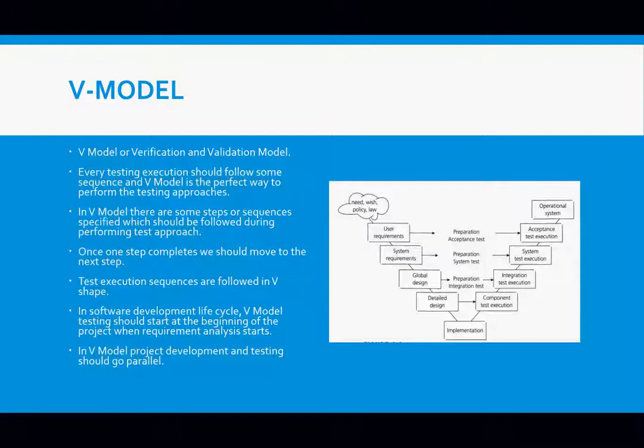So testing starts at the beginning of the project, as you can see. But it's not that you're going to be testing, you're going to be doing the preparation of the documents, because there's nothing that's going to be handed over to you before the implementation. But before the implementation, there will be requirements that you can work upon, and from the requirements, you can do your test cases. You can do any test design that you want to do. So you get those luxuries, but your testing is still going to happen from unit testing upward. So that's the V-model approach.